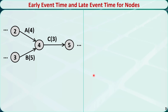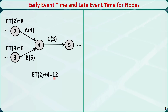Let's check some examples. This is a part of a project network with activities A, B, and C. Their durations are 4 days, 5 days, and 3 days respectively. Activities A and B are predecessors of activity C. Suppose we know the early event times for nodes 2 and 3 are 8 and 6 respectively. Let's find the early event time for nodes 4 and 5. The earliest time node 2 can happen is at time 8, and the duration of activity A is 4, so the earliest time node 4 can happen via A is 8 plus 4, equal to 12. The earliest time node 3 can happen is at time 6, and the duration of activity B is 5, so the earliest time node 4 can happen via B is 6 plus 5, equal to 11.